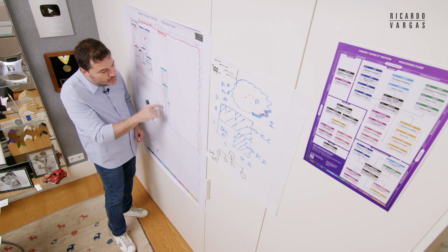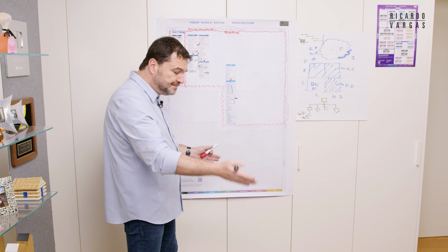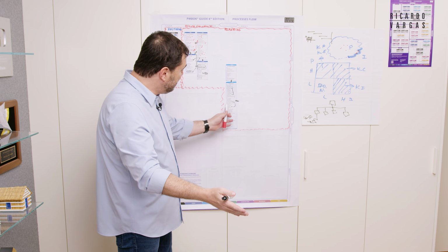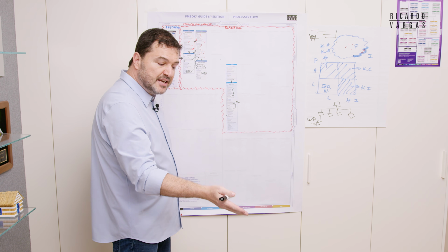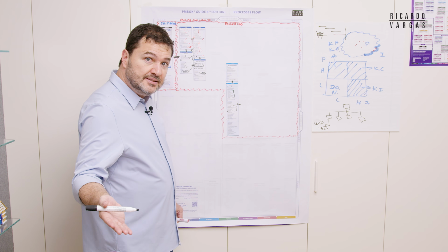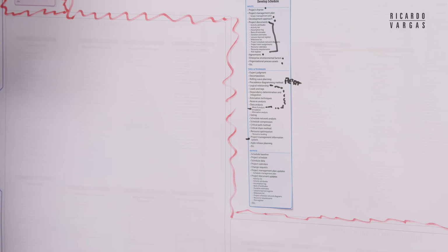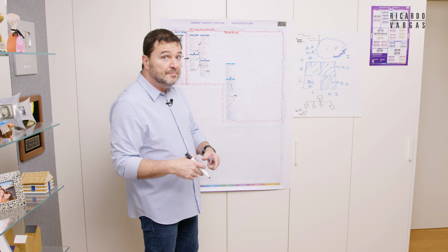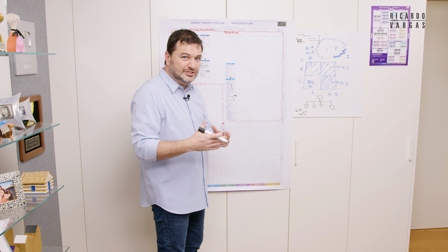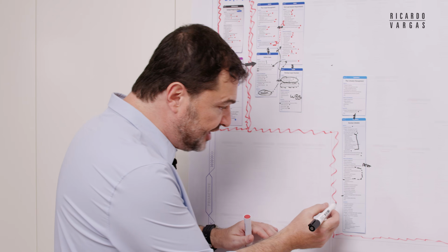Why? Because when you do this, you may see, okay, the deadline was 31st December 2031, and based on my schedule it is December 31st 2035. So I'm 4 years late. There is no way I can do that. So what do you do? You ask for a change. Maybe I need to reduce the scope. Maybe I need to extend time. Maybe I need more money. But if you do not change, it will be impossible. This is why you ask for change here.